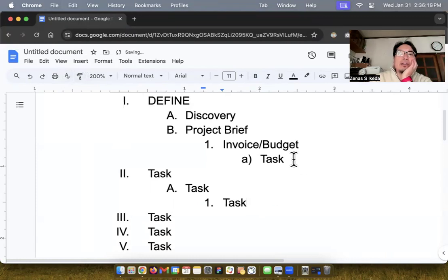Okay, and so if I were to look at this one over here, for example, and we wanted to keep track of it and say, hey, I am working on this particular task, and you're trying to communicate and find it, you would give it a call number, similar to how you would put a call number for certain books in a library, right? So we would say, hey, this is Roman number one dot a dot one dot lowercase a, sorry, this would be B, right? So this would be the call number or essentially the task ID number for this.